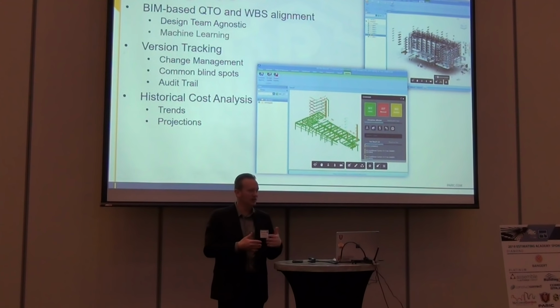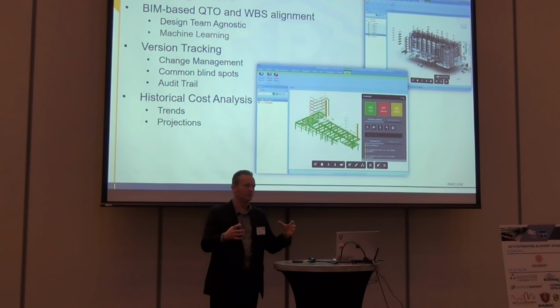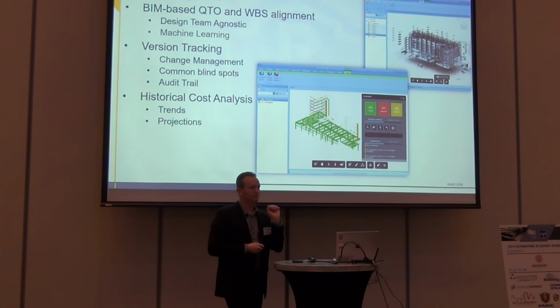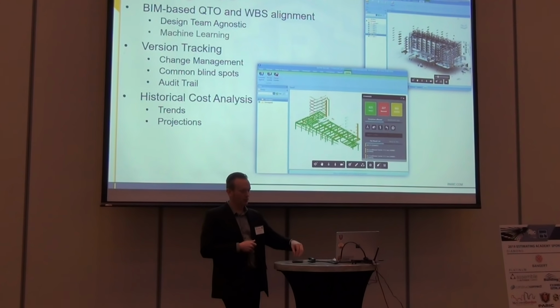It has no studs in it, it has no drywall layers, has no insulation in it. It's just dead geometry, right? But the one thing that it does have in a BIM is a kind of serial number, a GUID. And once you have that, it's established in your process, and that's your starting point, your baseline.